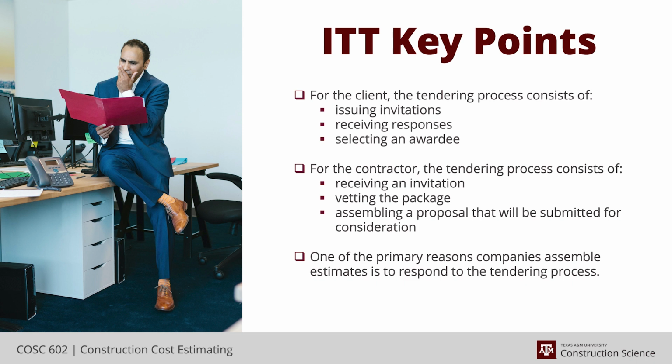I've even had some small jobs take several weeks to over a month, which sometimes is surprising when you're thinking, it took them 5 weeks to make a decision on a $5 billion job, and here this $9 million job's taking 5 weeks also. But as the money shrinks, the scrutiny does as well, and the criticality about in a $5 billion job, no one's worried about a $100 million line item in the basis. It's in the estimate. It's a small item. There's contingencies that are much greater than that.